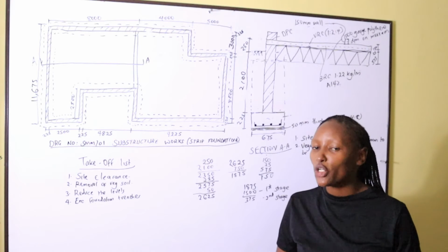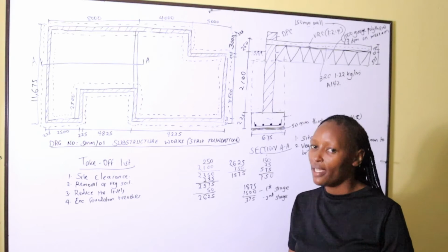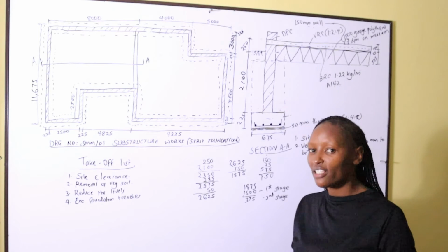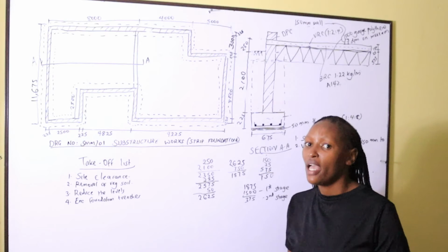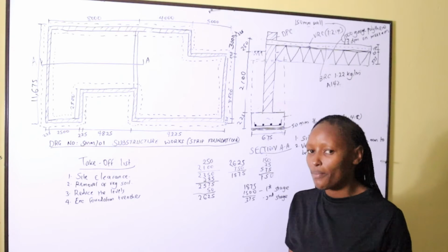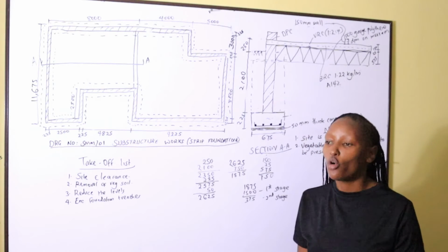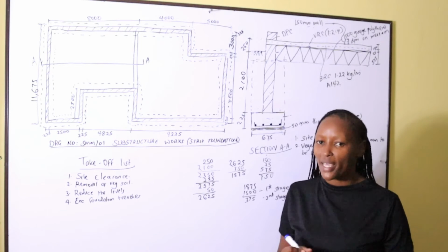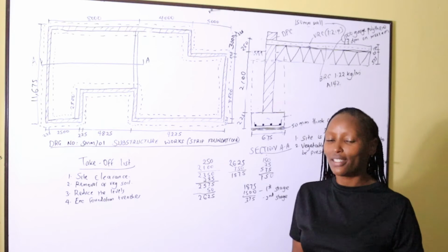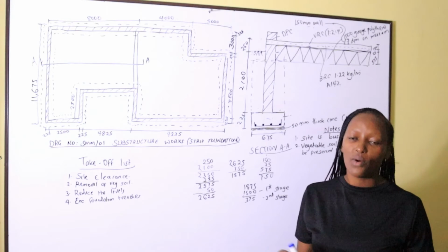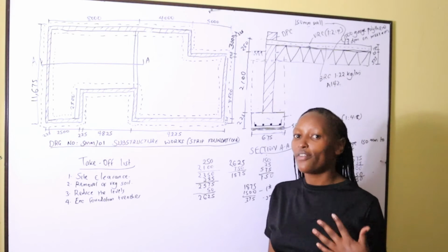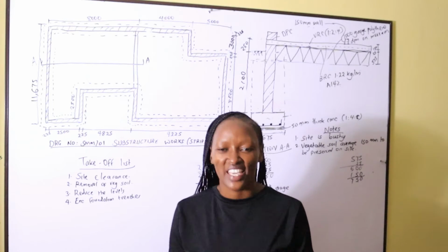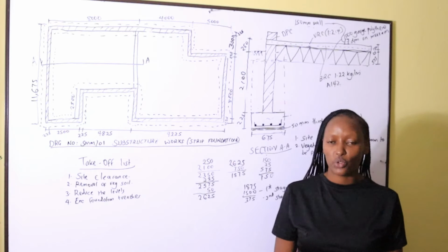From the reduced level, not exceeding 1.5 meters deep. Then the next stage, we shall excavate from 1.5 meters deep, not exceeding 3 meters deep. In the description column, you should always write from where you're commencing up to where. So commencing from the reduced level, not exceeding 1.5. Commencing from 1.5 meters deep, not exceeding 3 meters deep. Okay? Yes, that is exactly what we should do.